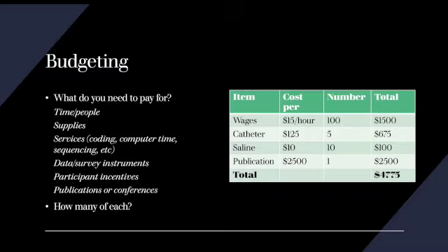And you build out a budget worksheet, maybe like the one shown here. Your institution probably has an internal worksheet that can help you with planning out everything that needs to go in. And of course, if it's an external grant, you're going to need to count on the indirect cost recovery or ICR, sometimes called overhead, and how much that will add to your budget.